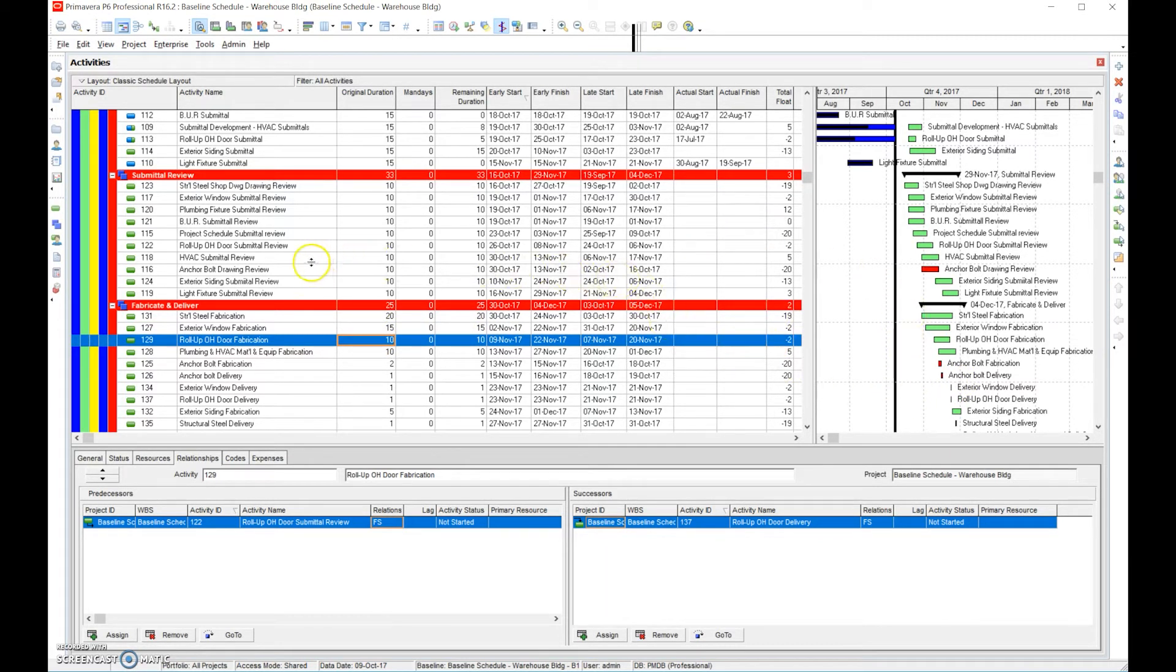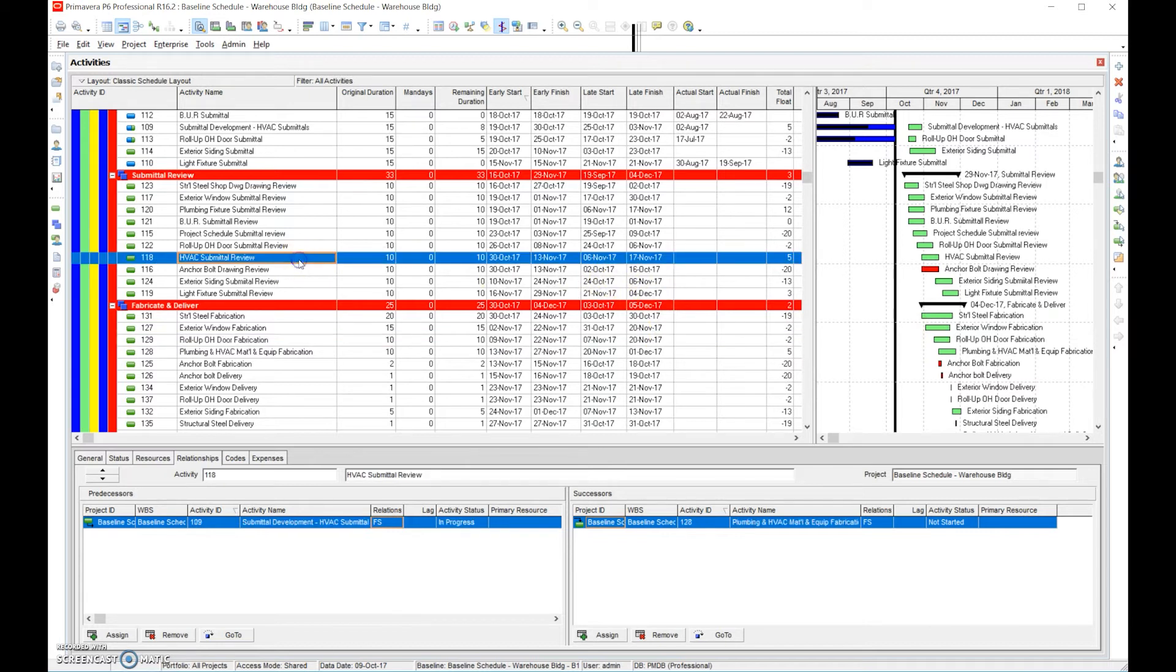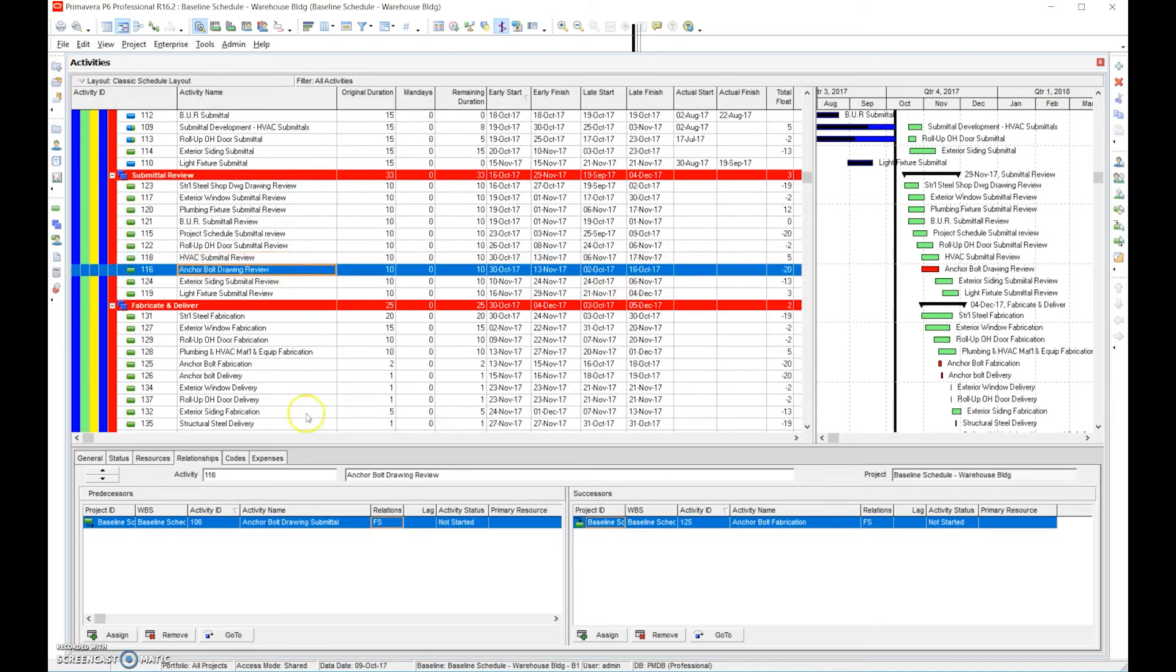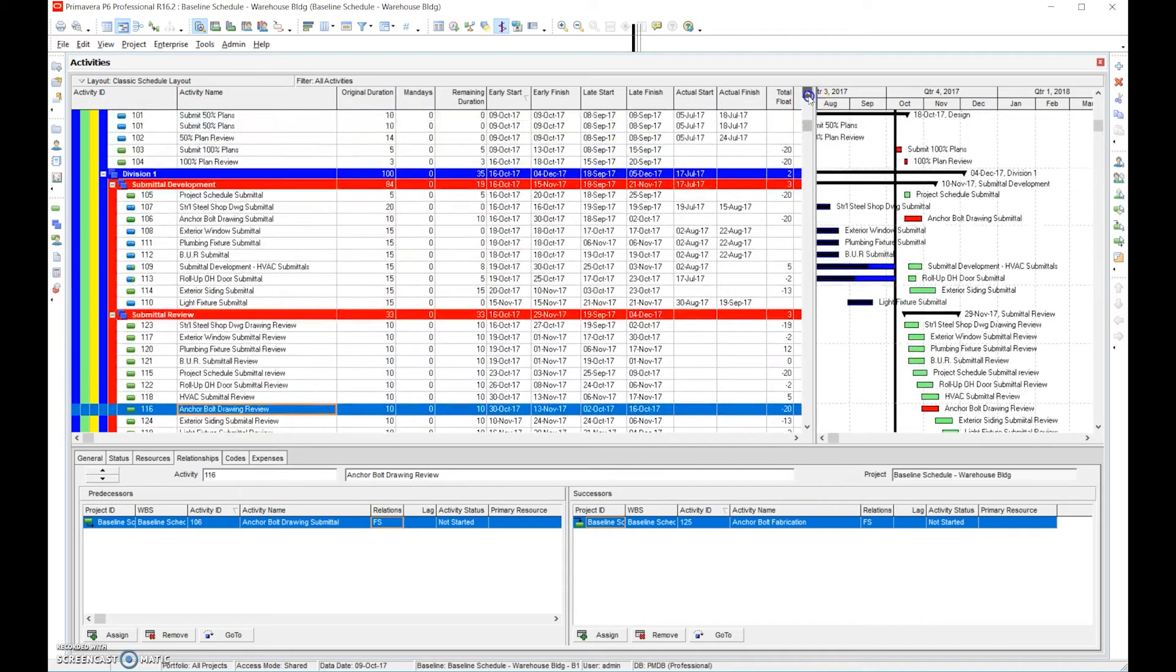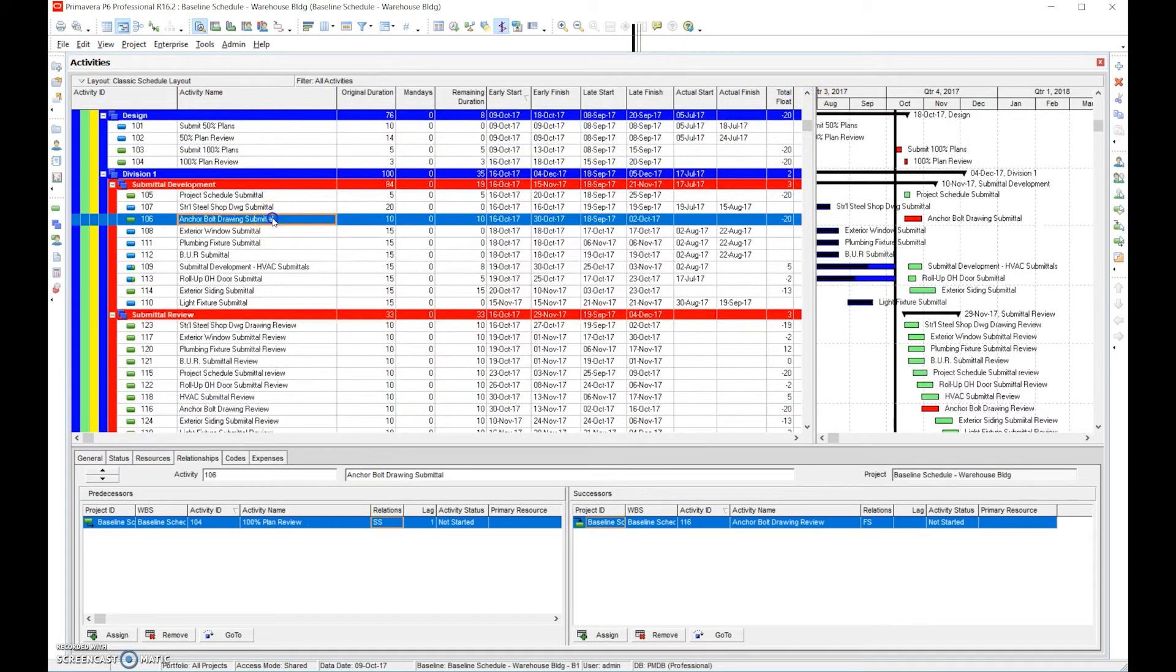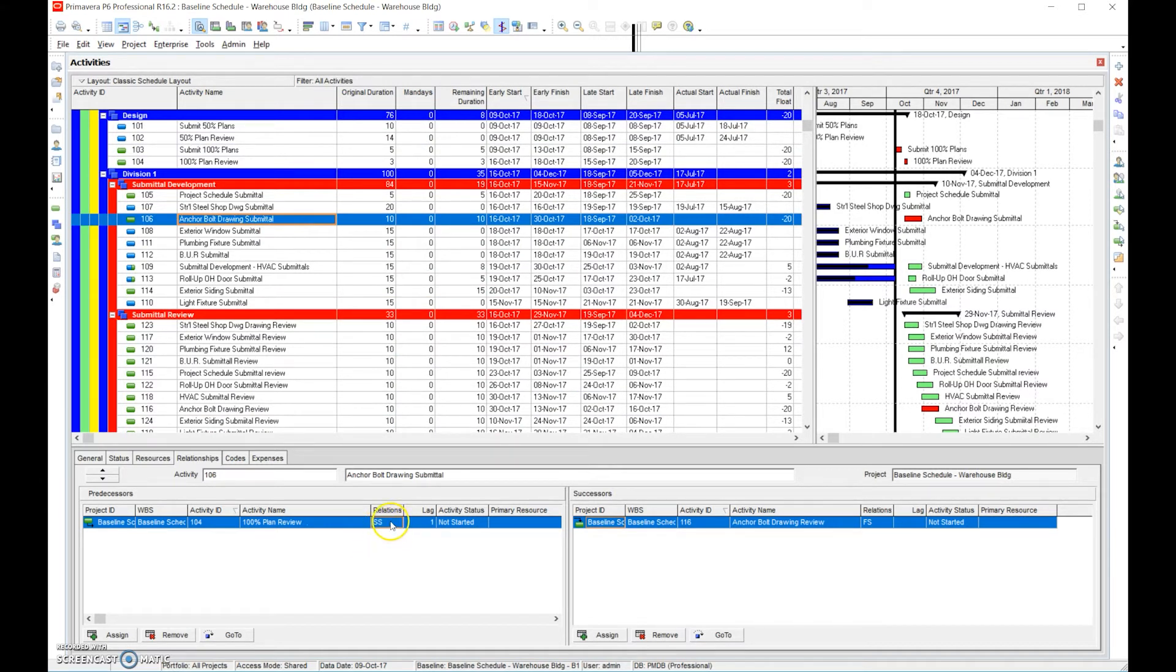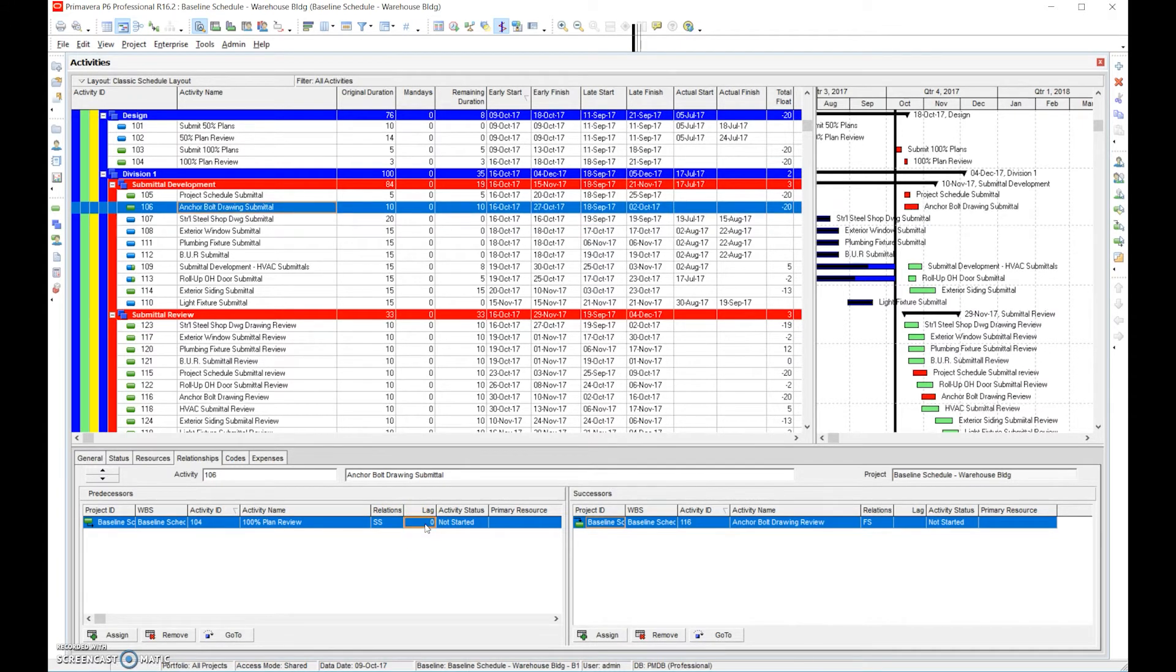That just got removed from the critical path. And then submittal reviews, anchor bolts drawing review, that's going to take 10 days. Maybe we look at that, that one doesn't look to be moved up much. Anchor bolts submittals, maybe we don't need to wait till 100% plan review done. That's why we moved to start to start. Maybe we don't need a day of lag. So we're changing relationships, we're changing durations and we're going to continue to do so.